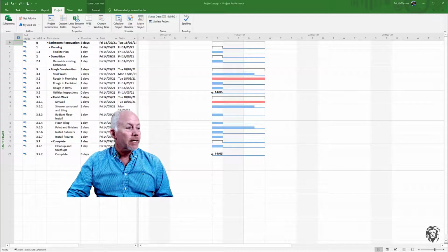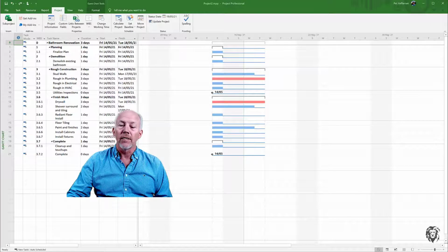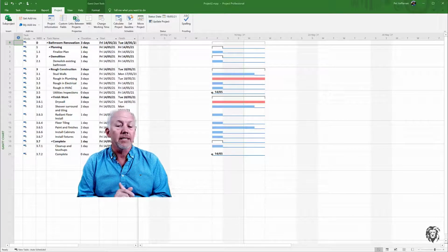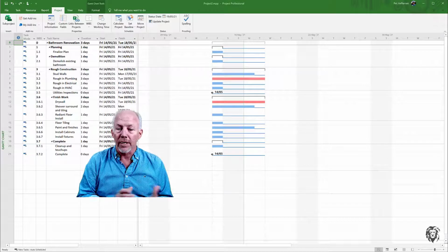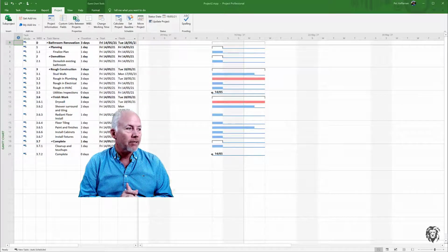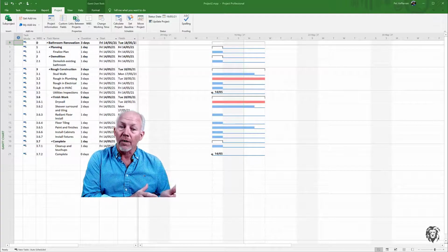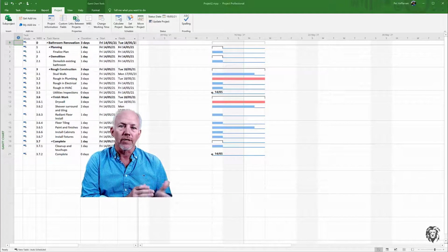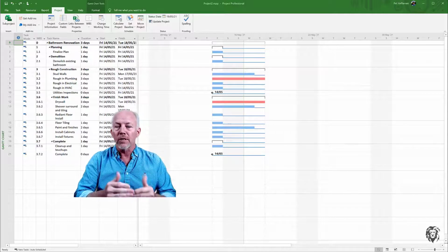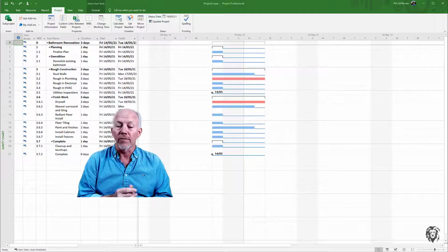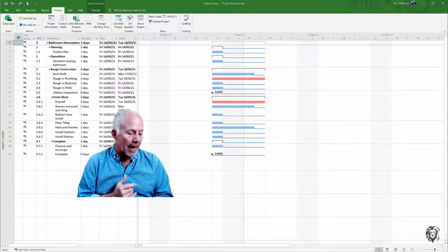So having all of our tasks in there, what we need to do now is to start to add the connections or the linkages, the predecessors, the dependencies, depending on which school of thought you come from, all sorts of different language we can use around it, between the tasks. And in doing that, because we've chosen automatic scheduling as our default and put all of our tasks in with automatic scheduling, we will start to see Microsoft Project calculate when they can happen and start to develop a plan for us, if you will, as to when these tasks are going to happen.